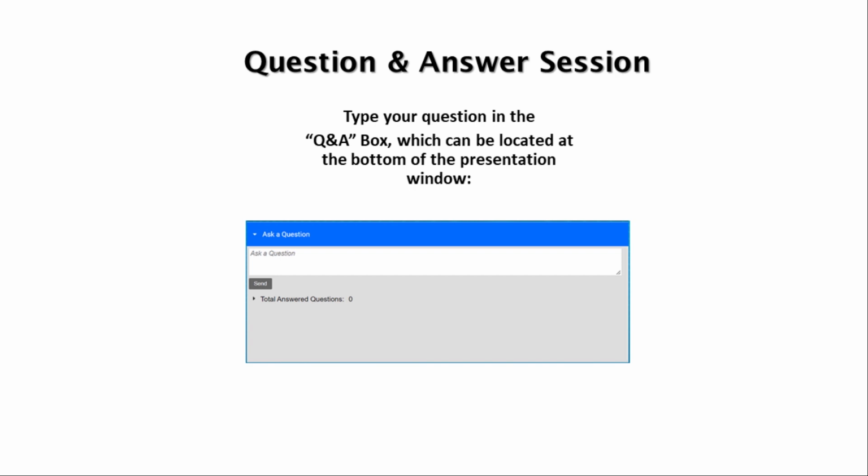Okay, and can one request or pay for a rush on an application? No. You can call an agency and explain to them, plead with them that it's critical that you get this license or permit for scientific research purposes, but these agencies don't have an additional fee you can pay to jump to the front of the line. So unfortunately, no, the U.S. government works in mysterious ways.